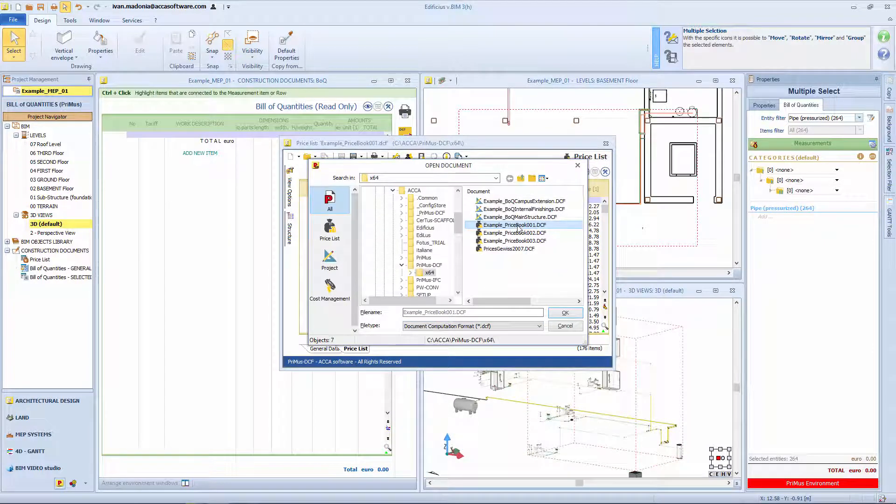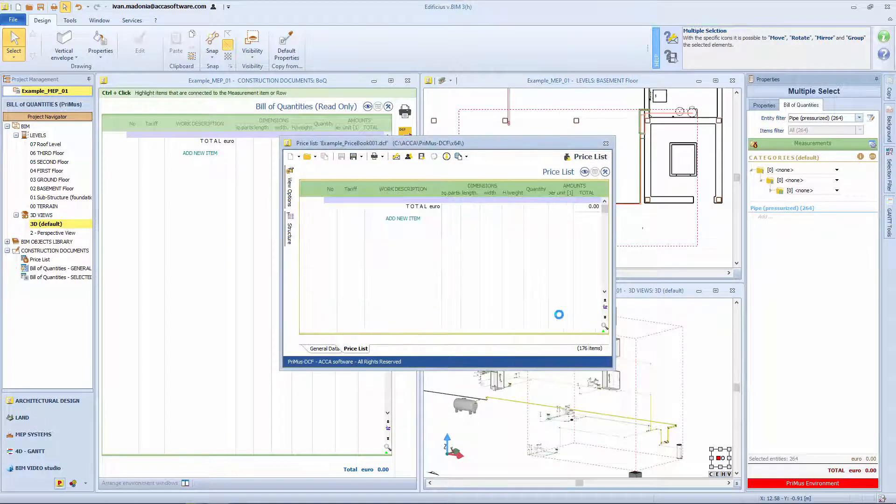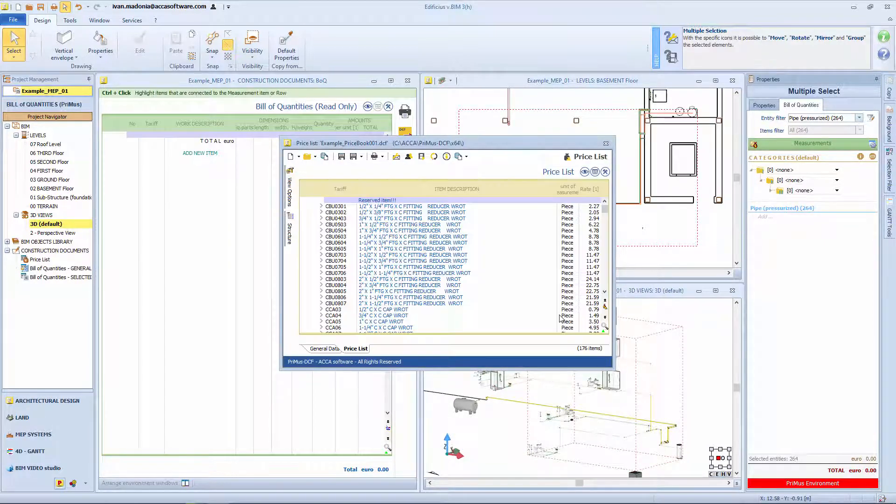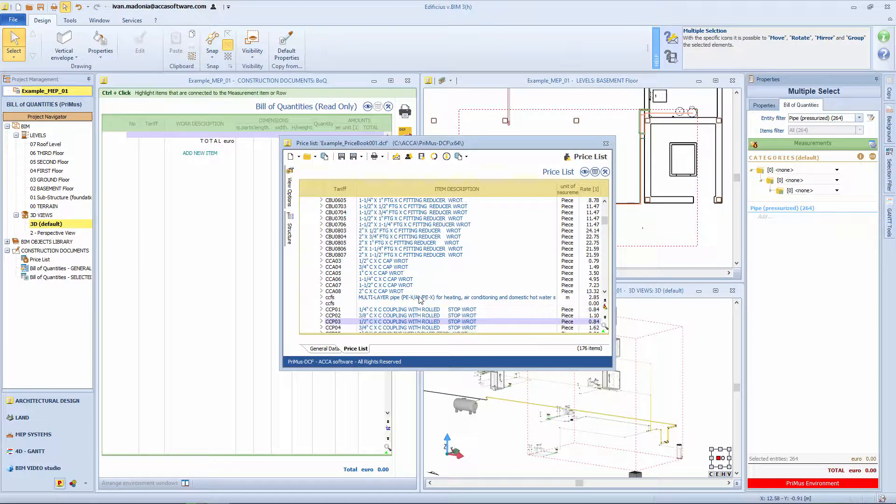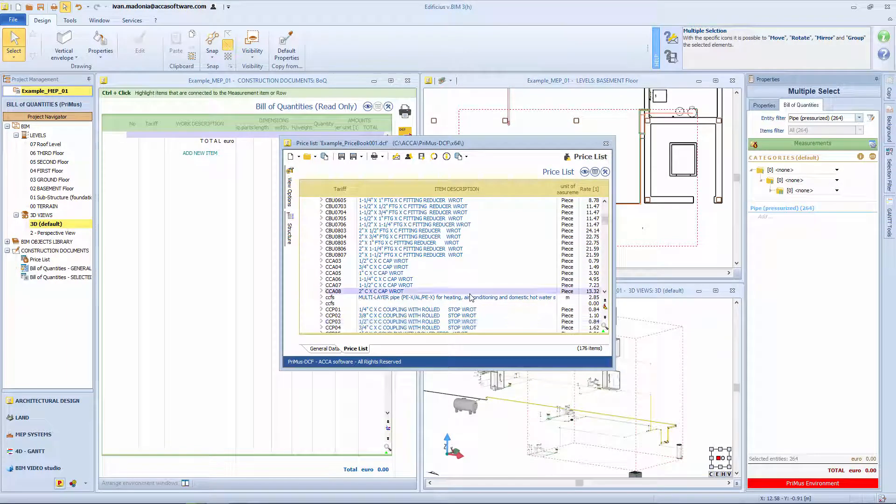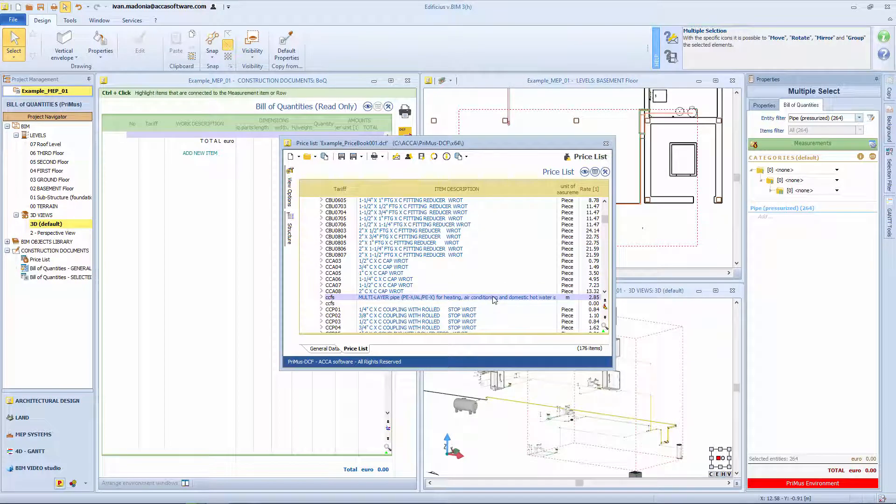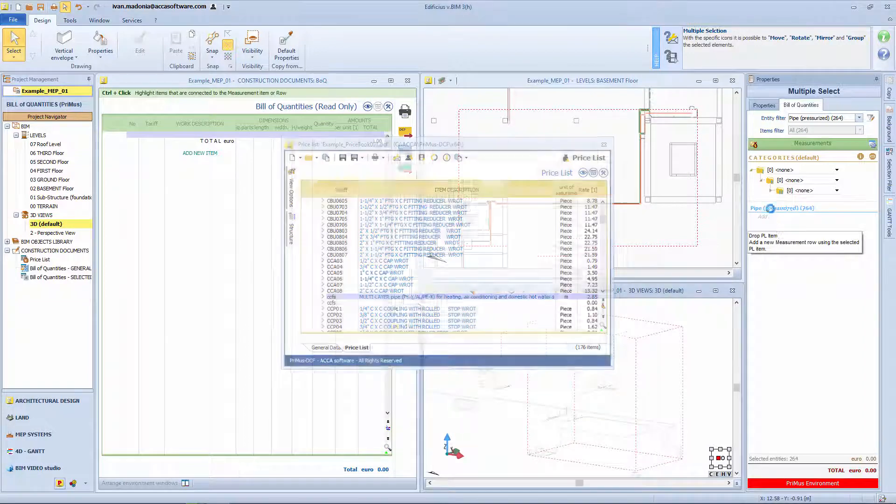By selecting the Open Price List option, you can open the reference price list to use during the Quantity Takeoff process. Now simply search for the item, once identified, with a drag and drop operation, drag it to the Estimating section on the right.